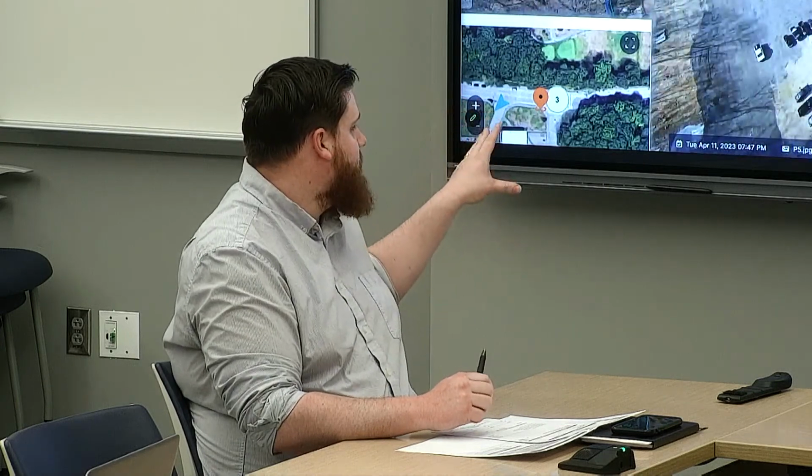And that's similar to what we'll be doing next spring for the athletic fields. This fall, we'll be planting the grass and the athletic sod at the athletic fields. But we'll have to come back in the spring to do fertilizer, slice seeding, anything that we need to fully establish the lawn and get acceptance from KBA. So those fields will not be in use for the 2024 spring sports season. They'll be ready for the fall of 24.